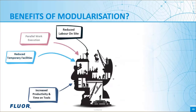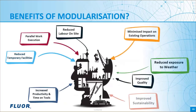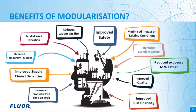To achieve the maximum impact and generate the greatest value, it is important that the modularization programme is directly targeted at the issues that need to be resolved. Failure to target the modularization programme will not deliver the desired results. When targeted correctly, modularization can help generate several improvements: reducing the number of people on site, reducing dependencies between tasks and work groups, minimising the impact on existing operations, increasing productivity, and minimising temporary facilities required on site such as car parking, storage, and catering.